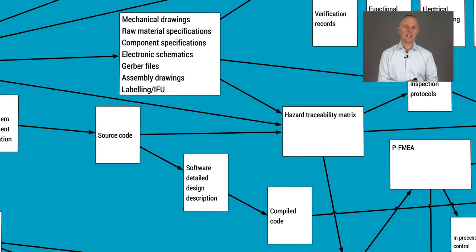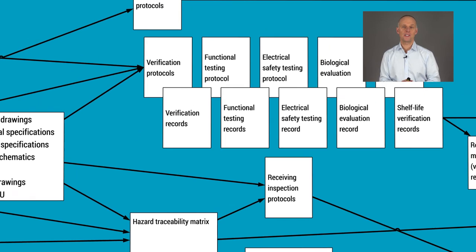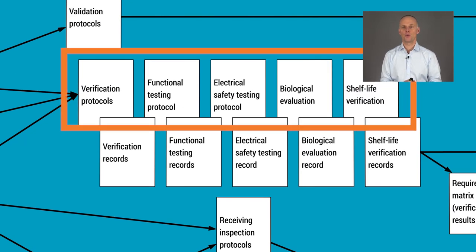In parallel with designing the product, you can create more detailed verification protocols to prove that what you have designed meets the design inputs. In this example, I have pointed out a number of likely areas to create verification protocols for. Keep in mind, you're likely to have a lot more protocols than what you're seeing here in this example, probably closer to 100 than to 5 as shown here.